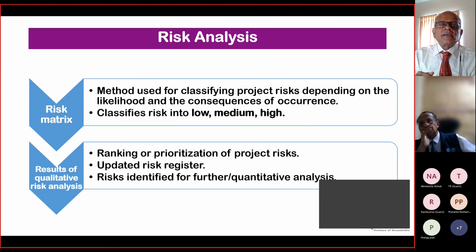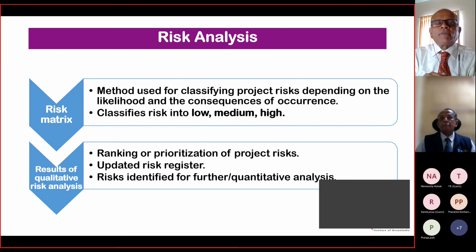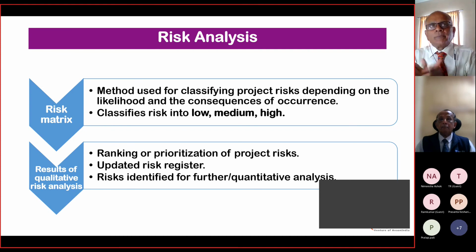You see whether the risk is high and, at a micro level, what the cascading effect would be as an impact on the consequence for the contract that you have been awarded. So it is crucial that you have the matrix put in first, where you define what qualifies as a low, medium, and high risk potentially, and whether it is on a macro or a micro level. And you do both qualitative and quantitative risk analysis to rank them as what is going to be a complete showstopper versus ones that can be mitigated by remedial steps that an organization or a contractor takes.